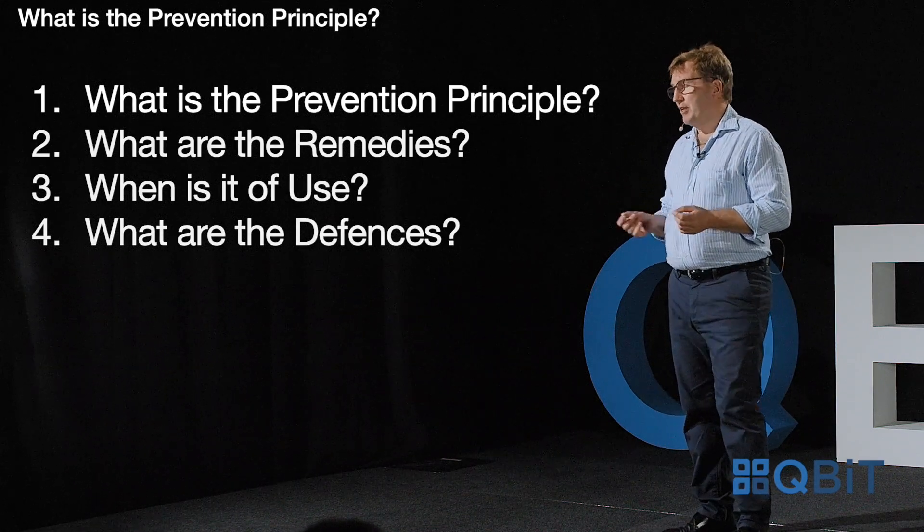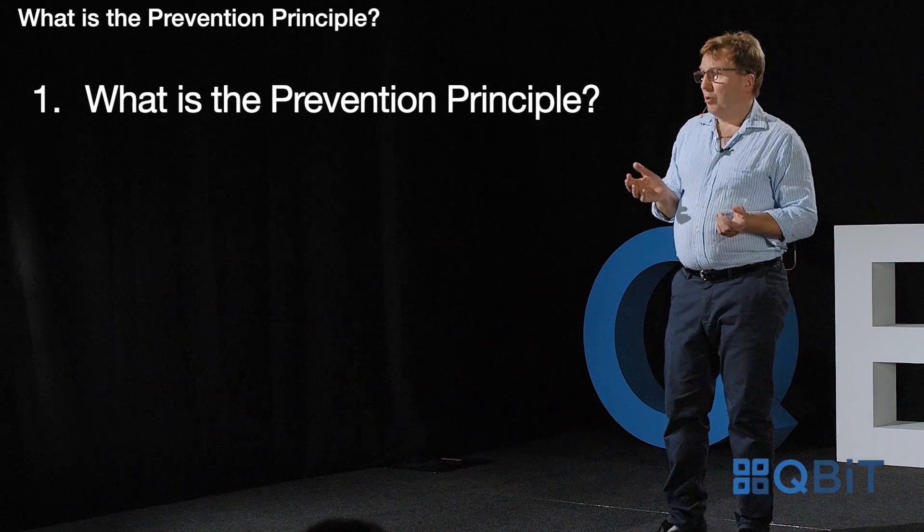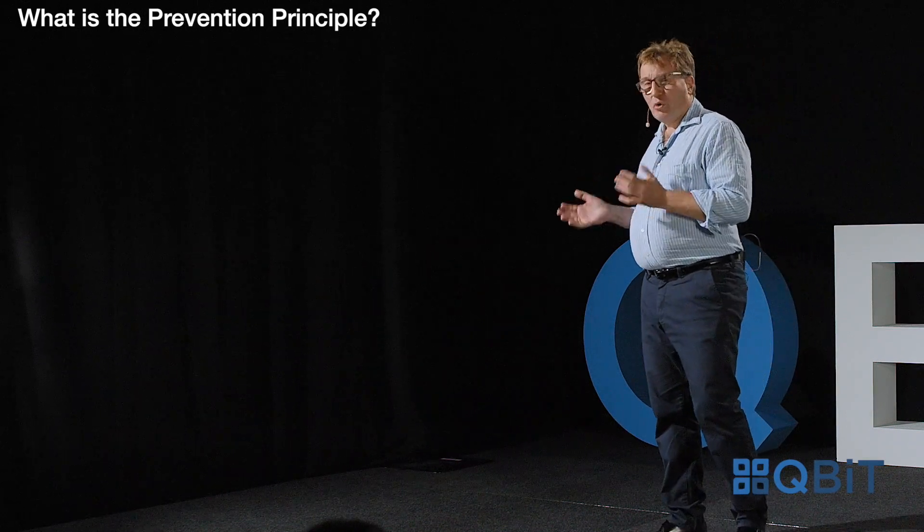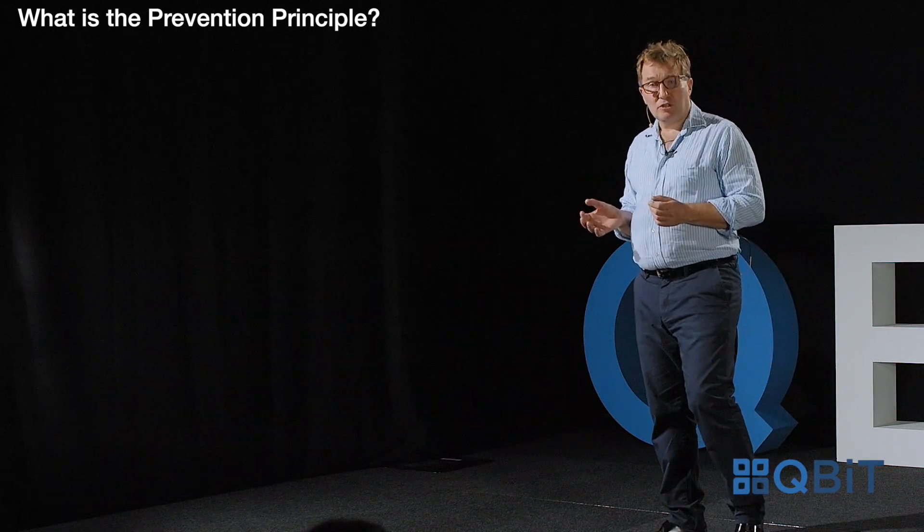There is a debate in English law as to whether the principle is a rule of law or a question of the construction of the particular contract, but most of the time we don't need to worry about that debate. However, it seems to be settled that the principle is one which arises as a matter of construction of the relevant contract, and it follows that the terms of the contract are therefore going to be important in determining the scope of the principle in any particular case.